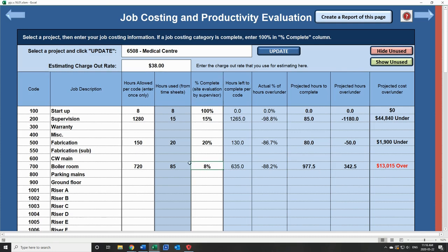It allows me to change the crew. It allows me to augment the crew. It allows me to find out what the problem with the crew is. What's happening on site? Why is it costing us so much money? At the end of a job, we're going to lose $13,000 on this particular task. So what we want to do is make sure that we can change the productivity by changing the manpower. You can't speed up men. You can't tell the guys to work faster. That doesn't work. But what we can change is maybe the configuration of the team on site.